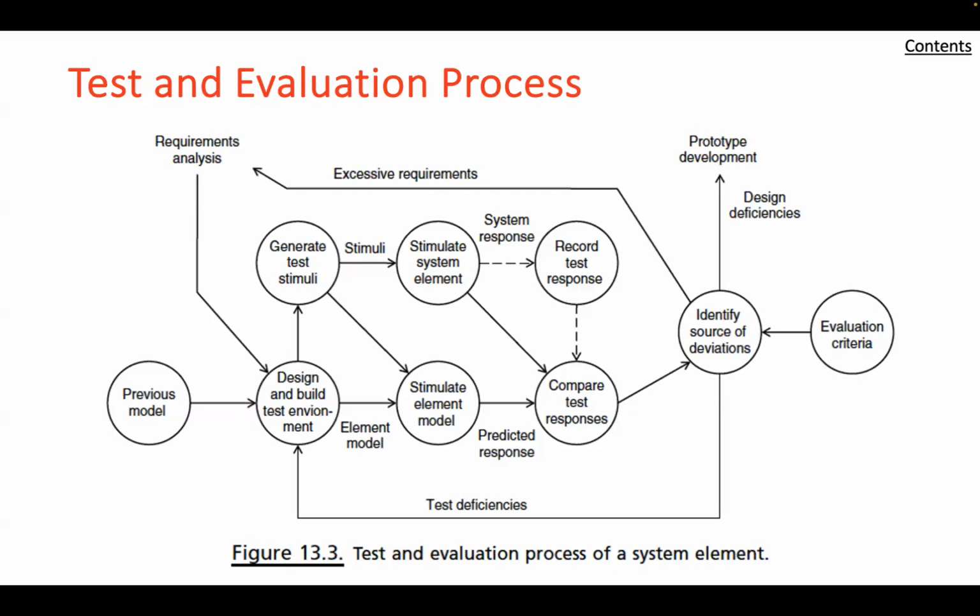So the TEMP is not so much a test plan, which also has to be developed, but a test management plan. Thus, it does not spell out how the system is to be evaluated or the procedures to be used, but it is directed to what is planned to be done and when. And so the textbook goes into the specific things that need to be in a TEMP.